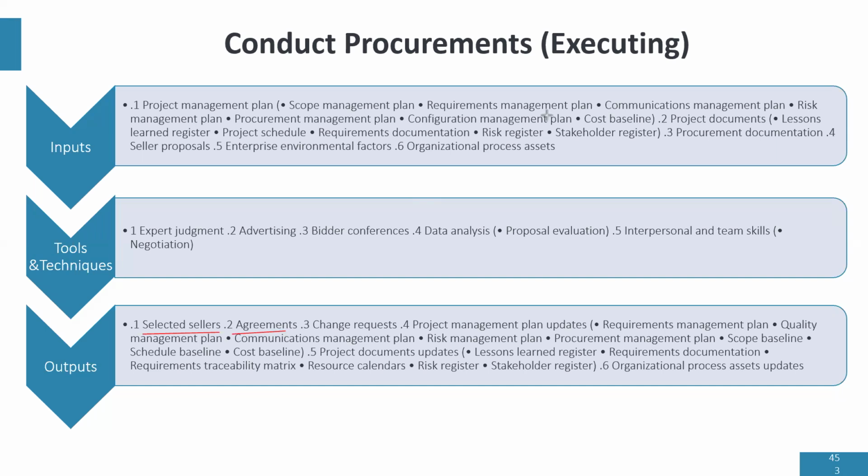So in conducting procurement, you are going to look at the seller proposals. So sellers have started dropping their proposals, and your procurement documentation are part of the plans that you've already created. Your procurement documentation includes your procurement statement of work, SOW, your bid document, your independent estimate.